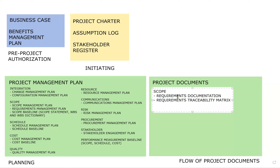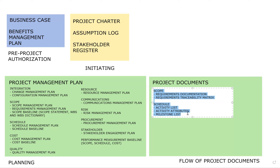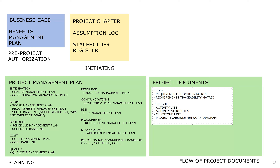Going into schedule, there are things such as an activity list, activity attributes, and the milestone list. The activity list is just a list of activities; the activity attributes further define the characteristics of those activities. The milestone list is a list of key events and accomplishments we're seeking. We also have a project schedule network diagram from sequencing the activities, plus duration estimates and basis of estimates — BOEs — from estimating the durations.